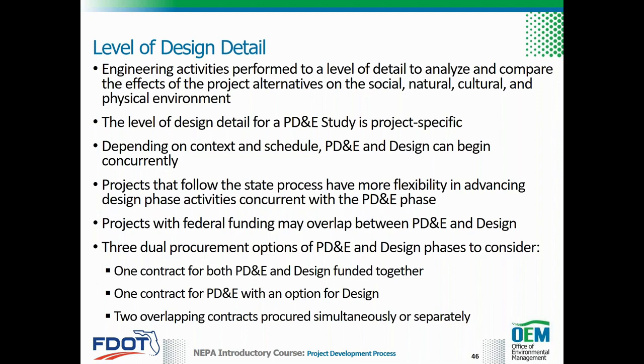FHWA Order 6640.1A, Policy on Permissible Project-Related Activities During the NEPA Process, clarifies the level of design detail allowed in PD&E studies. To utilize the flexibility provided in the FHWA directive during PD&E, districts may perform preliminary design activities prior to a NEPA decision, regardless of the project delivery method that is used. However, final design activities may not be advanced until a NEPA decision has been issued. A list of preliminary design and final design activities is included in Chapter 301 of the Florida Design Manual.